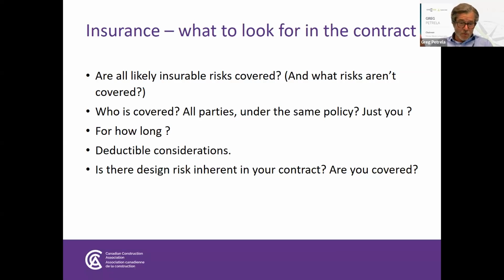So, to our water damage example, where the building is 3 weeks from being finished and you have a $250,000 water incident because something burst or was ruptured or was hit, there's going to be a large deductible there. And that's very tricky for a subcontractor to insure. It's doable. We actually have wording that we built in. It takes a lot of negotiation with the right insurance companies to get that. So it's technically doable. It's certainly not commonplace.